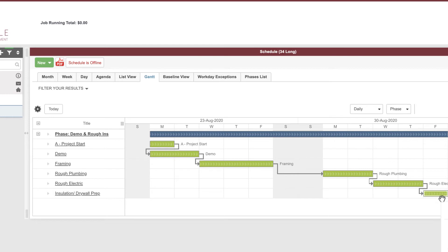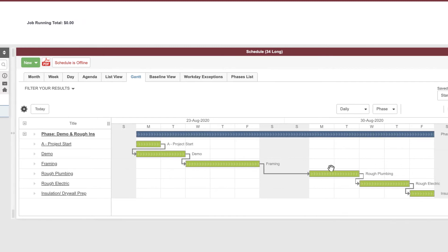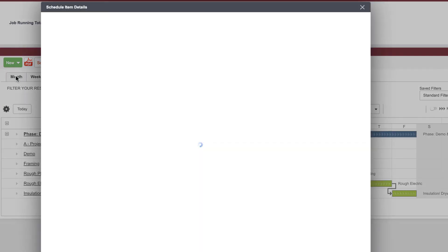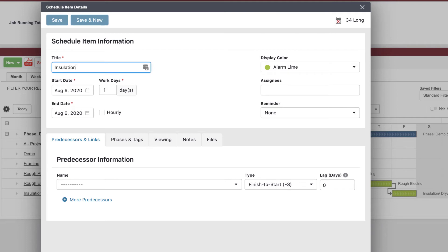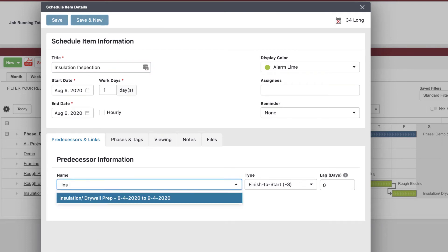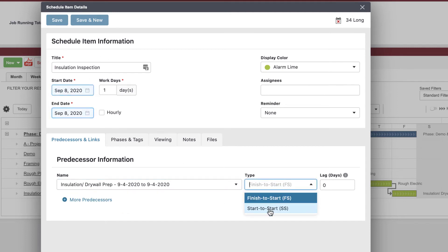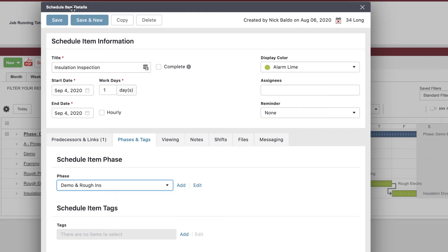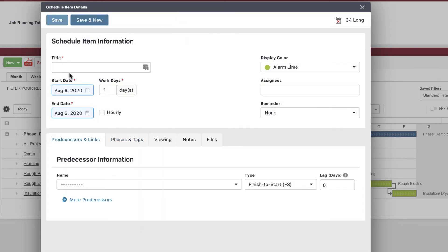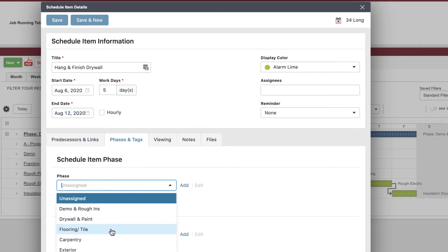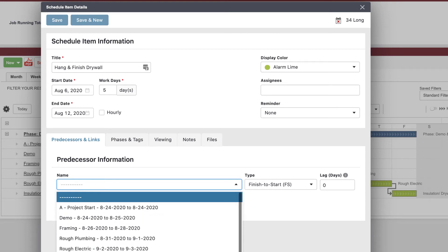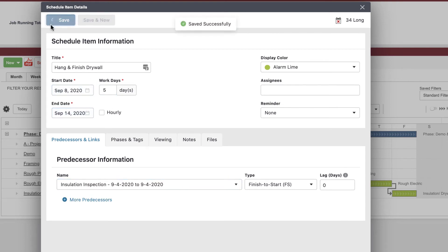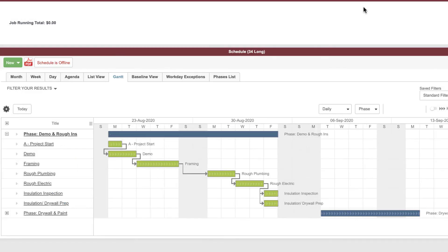Let's look at predecessors again. I want to add an insulation inspection. I know the inspector and can typically get it done the same day I complete the insulation. I'm going to make this insulation inspection a start-to-start dependency. Then I can't hang drywall until that's done. I'll add the hang and finish drywall task — maybe five days — put it in the drywall phase, and make it a predecessor on the insulation inspection.